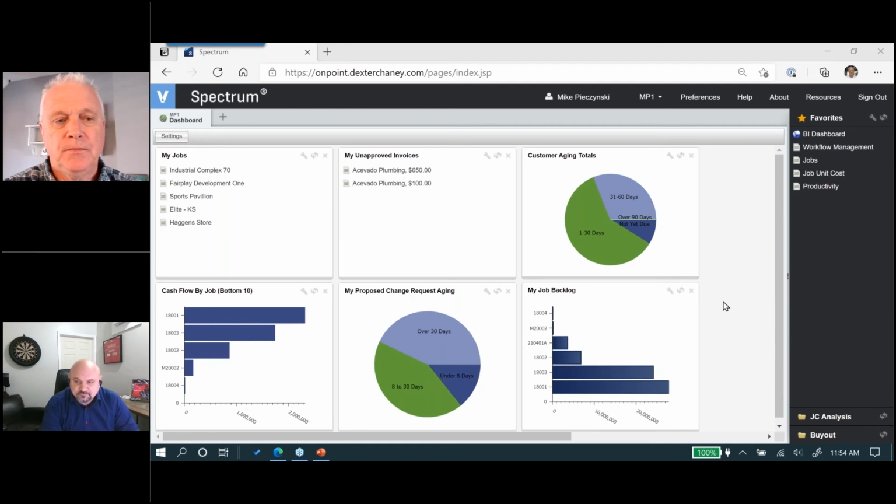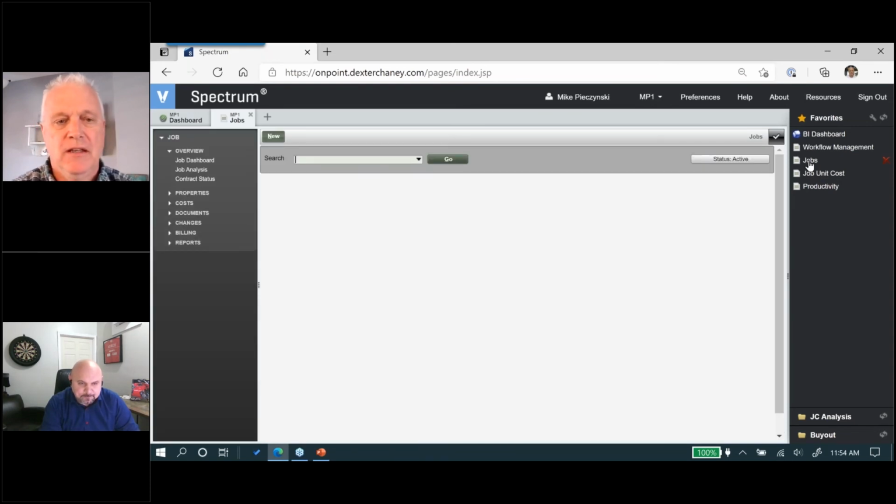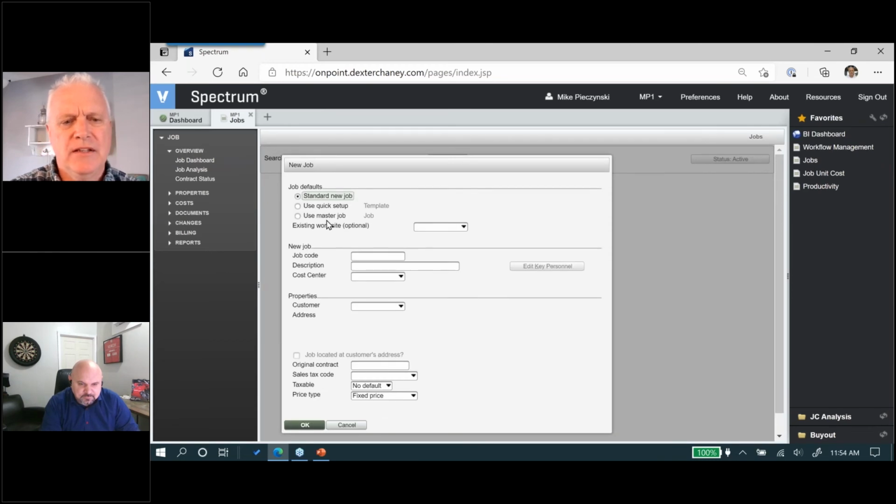and then bring in the change. So here in Spectrum, I'll hit jobs over on my shortcuts, to go to maintenance jobs. And then I'll click on new because we're going to create a new job. Now, in this case, I'm going to manually put in a job code. I tend to put in the date, 21/04/01, April the 1st. And we're going to call this HCSS HeavyBid project.